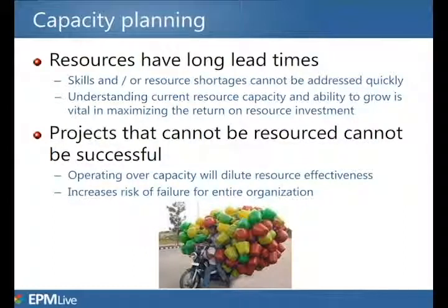Resources have long lead times. We can't just move somebody around or bring somebody into the organization and have them be 100% effective on day one. If we have to bring skills into the organization, or if we have to address shortfalls in our resources, we need to identify that those resource shortfalls are going to exist long before they really hit us, so that we can actually do something about it while we've still got time to make a difference and not cause the projects to slow down or not cause things to be put on hold. At the same time, we have to understand what our current resource capacity is, because that's going to drive our ability to grow. And if we don't understand our ability to grow, we're not going to be able to maximize the return that we make on resource investment.